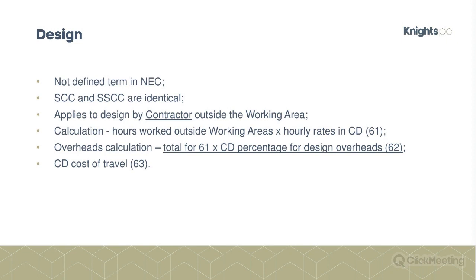Design is similar; it's for off-site design. It's not a defined term under NEC. For this one, the schedule and the shorter schedule are identical, which makes it easier. So it's design carried out outside the working areas. As you'd expect with design, you're paying hourly rates, so the hourly rates need to be included in the contract data. And again, I raise the issue: if you don't include any hourly rates, does that mean the charge is £0 per hour, which wouldn't be good news for the contractor or subcontractor?